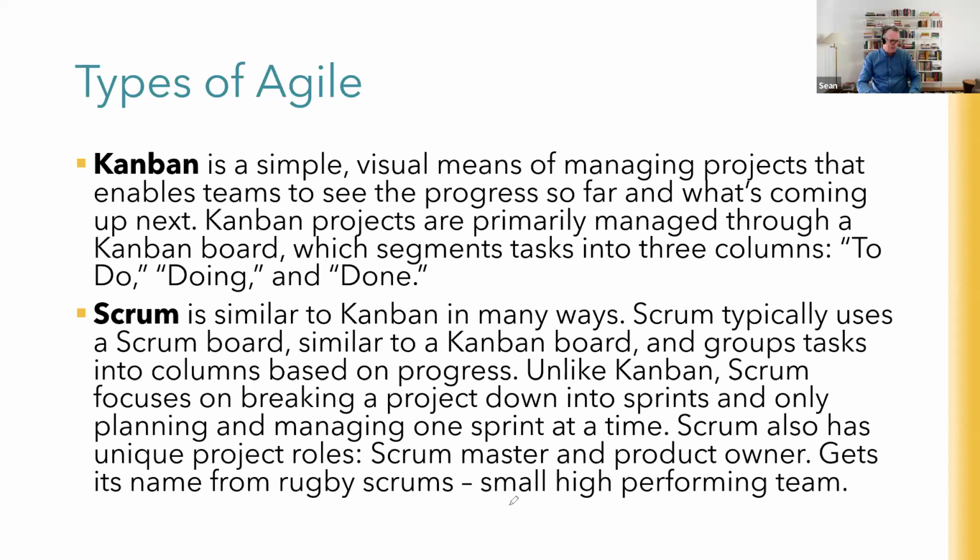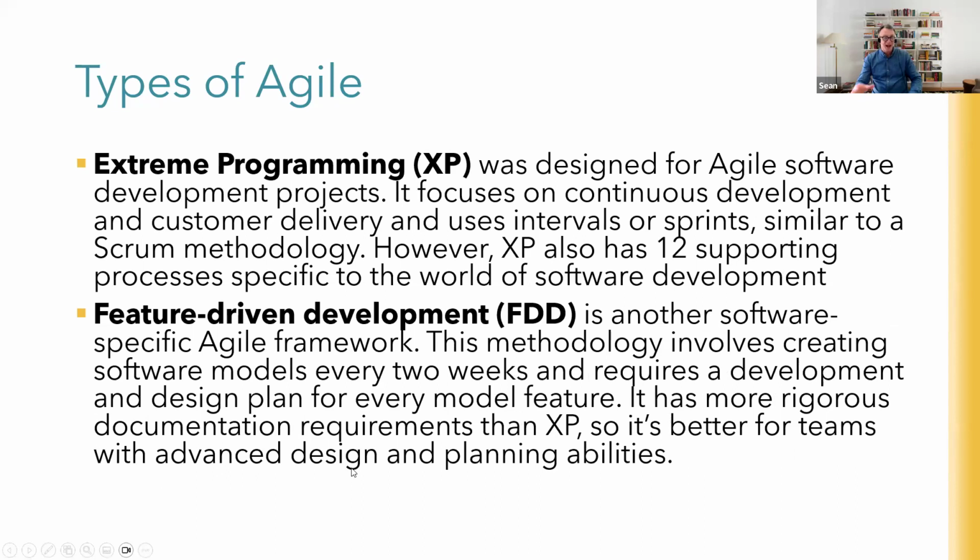coming out. But there is a particular methodology called Crystal. It is agile for larger size teams, like 50 to 100. So there are agile approaches which you can use for larger teams, but for Scrum, the ideal team is less than 8, a small high-performing team. So Kanban and Scrum, and we are going to cover Crystal coming up very shortly on the next slide, just